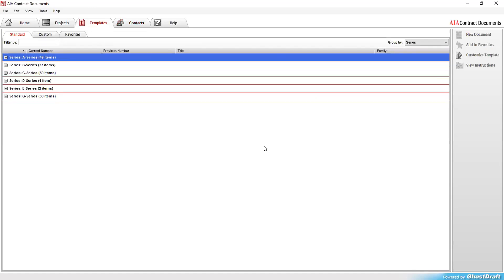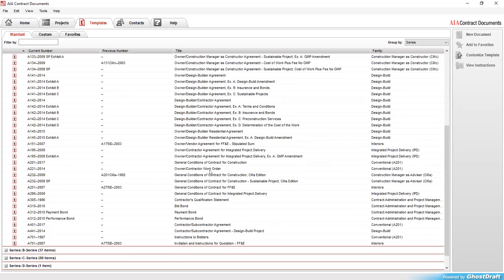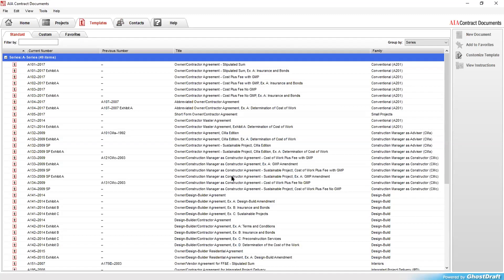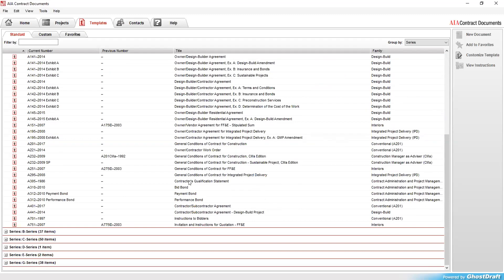Under Templates, the AIA has different series - Series A, B, C, D, E, and G. Expanding Series A, these are all the contract documents under that series. The AIA has a complete, huge arsenal of different types of documents. Here's our AIA 101 - this is the standard form agreement, a stipulated sum between owner and contractor. The AIA 102 is the cost plus a fee with GMP, that's our guaranteed maximum price contract. Here's our AIA A201 which is the General Conditions to the Contract for Construction.